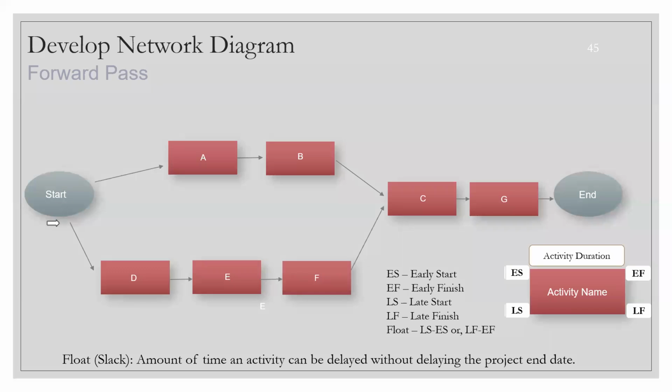So in the network diagram, this is the start button and this is the finish, right? In between, this A, B, C, D, E, F, these are all the activities which we planned in the very first chart, if you remember. We said B has a dependency on A. So you start A and then you go for B. You cannot start B till the time A is completed, like your design part cannot be started before the requirements are captured, right?